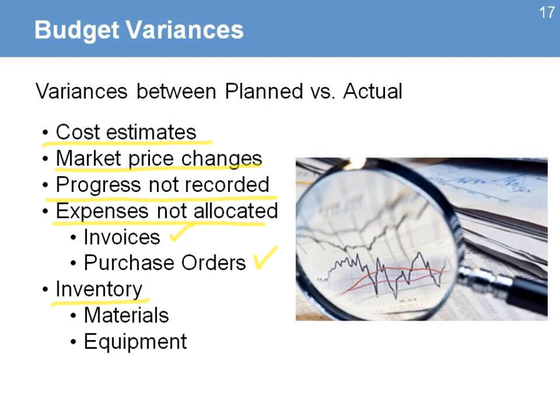If I only get paid for how much is built, then I'm only going to be able to collect as earned value the construction that is physical and that the beneficiaries or the group or the teams that are in charge of that can actually physically count it. But the inventory, which are items I already spent, they are not reflected in that calculation of earned value. So that's an important element also to have a good understanding, so you can find in these areas where you might have some variances between where you are in terms of what you plan and what are the actual costs.